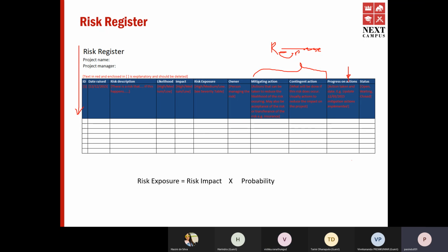Generally in a waterfall project, we have shadow resources: very junior people in the team whom we train, so that we can manage a person going on leave for a day or two. But since it's a week, it might not be easy to catch up.